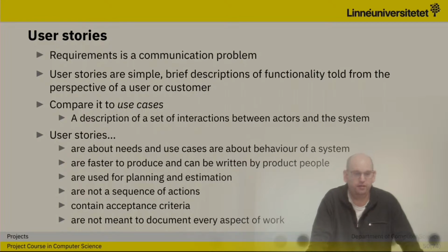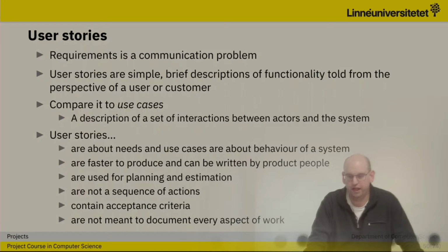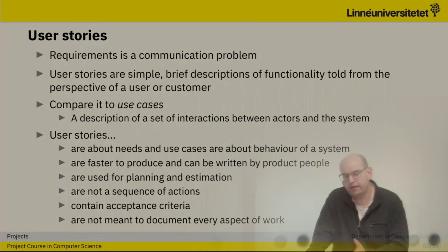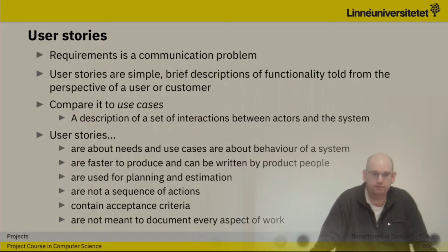I'd like to say, as a guest, I want to be able to make a reservation. And I don't have to say first this and then that, or that the next user story must be the continuation of that user story. But what is important is that a user story, to be correctly implemented, has to have an acceptance criteria. So we need to know when it's done.